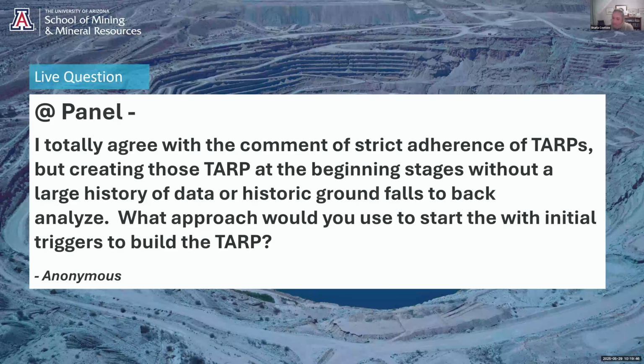And what I normally tell our clients is, when we commission a radar system, it's not just about physically building the system and giving the team on site training and then leaving you to just get on with it. Commissioning a system takes a number of months, in the sense that you need to set up those scan regions, analyze the data, and understand what the data is actually telling you, which then feeds back into the trigger action response plans.